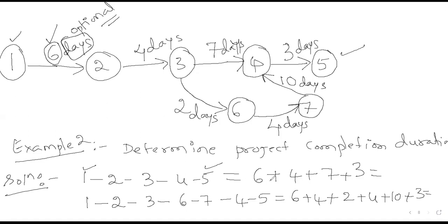If there are any doubts, you have to stop and ask. Sir, for the second part, why do we have to include 1 and 2? Here, always remember that the path should include the starting node as well as the ending node, the first and the last node.